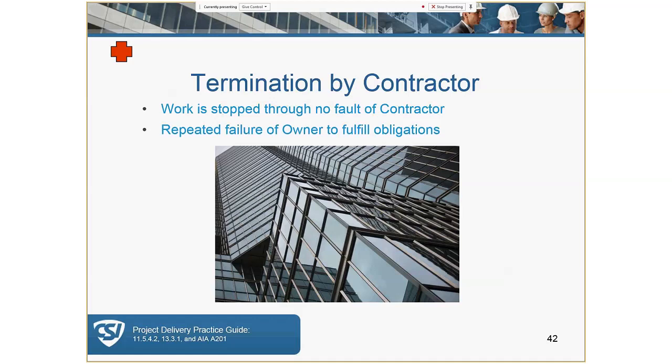So if there's an Indian burial ground that's found during excavation, or the lost city of Atlantis, or a hurricane cuts off all the utilities and access to the site, for example, or again, loss of bank funding through default of the bank, then the work may need to be suspended for a period of time. It's important to note that overhead, material, and labor costs can increase substantially, or there may be remobilization costs that are going to have to be accommodated.